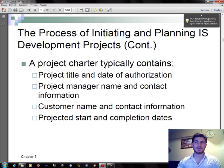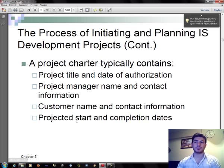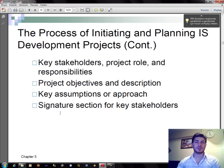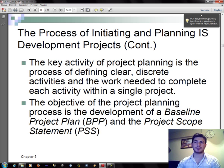A project charter typically contains: project title and date of authorization, project manager name and contact information, customer name and contact information, project start and completion dates, key stakeholders, project roles and responsibilities, project objectives and description, key assumptions or approach, and a signature section for key stakeholders.